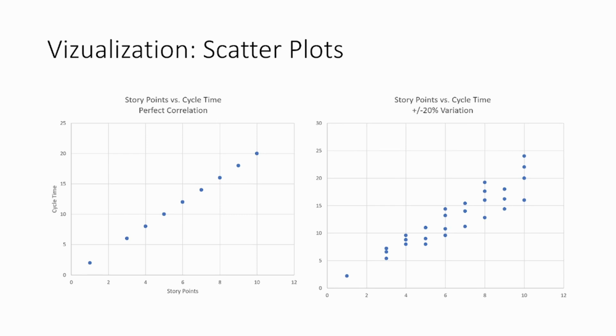Of course, we do know that there is a degree of uncertainty in our basic model. You can see what that looks like in the diagram to the right. There is random variation, and the larger the piece of work we estimate, the more uncertainty we have about when we will be done. Still, even with the uncertainty, the idea is that we have a basically linear relationship between estimate and actual duration. But do we?